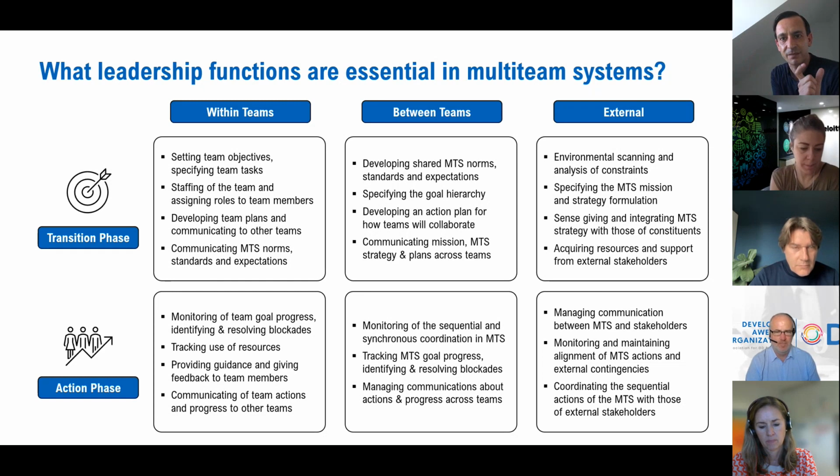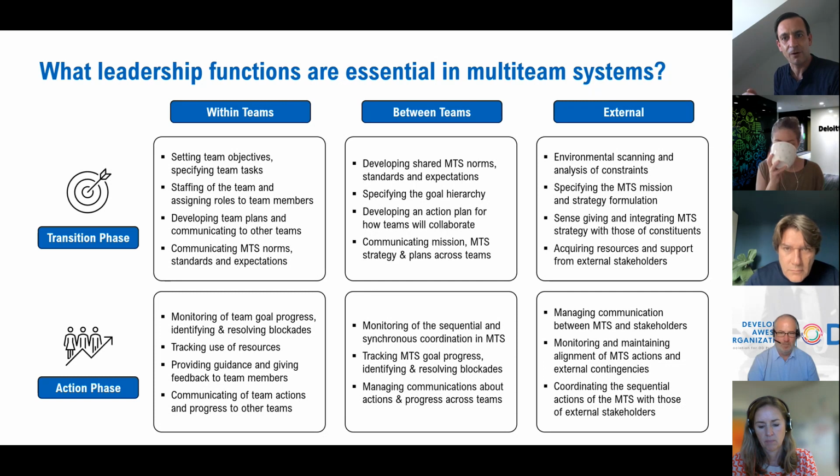Nobody says that a multi-team system is the same in the beginning as in the middle as in the end, because you can have additional teams that are needed only for a specific phase of the multi-team system. And this is something you should initially plan. Otherwise, you often have the big problem that people are sitting around that don't contribute at the moment, being bored, saying, why am I here? They lose their motivation. That's why you should really deliberately think about what is needed when in order to achieve the overarching goal. And then you should develop an action plan for how teams will collaborate.